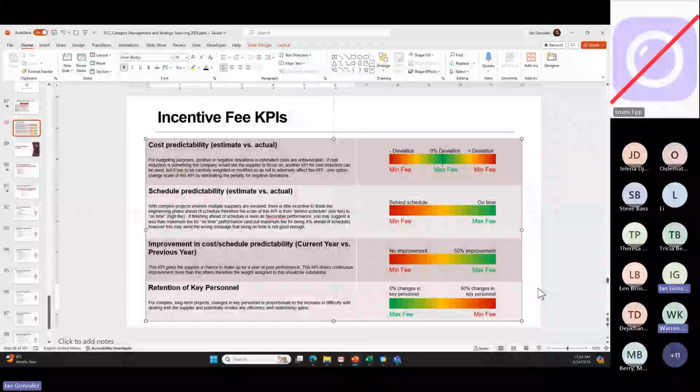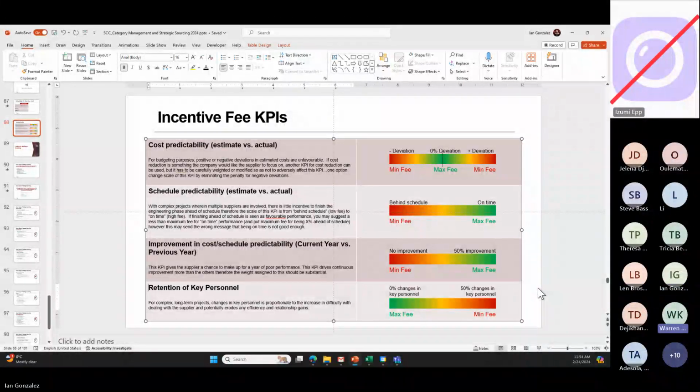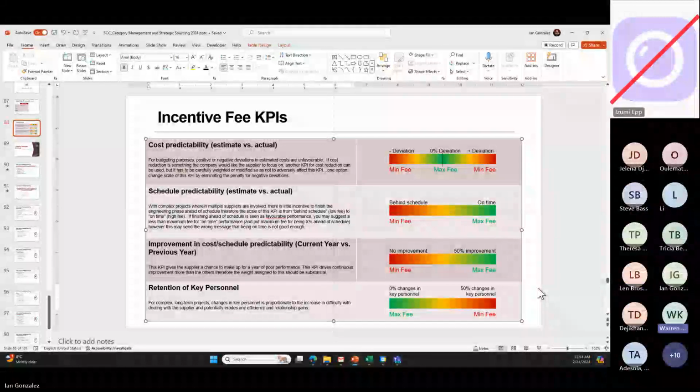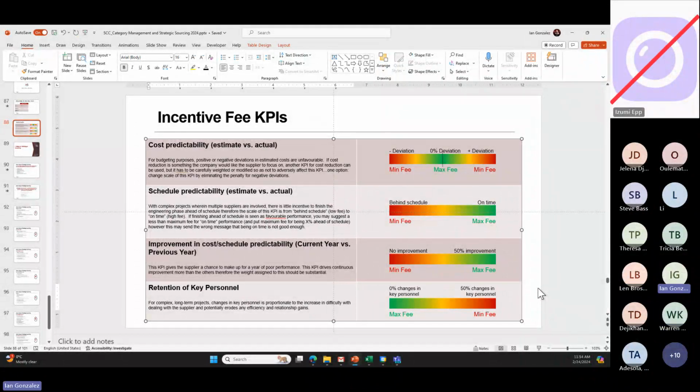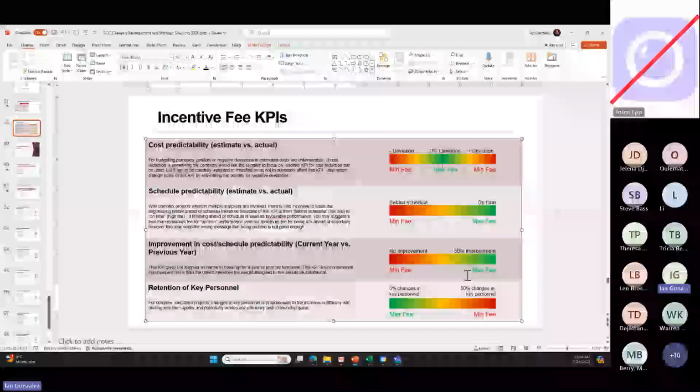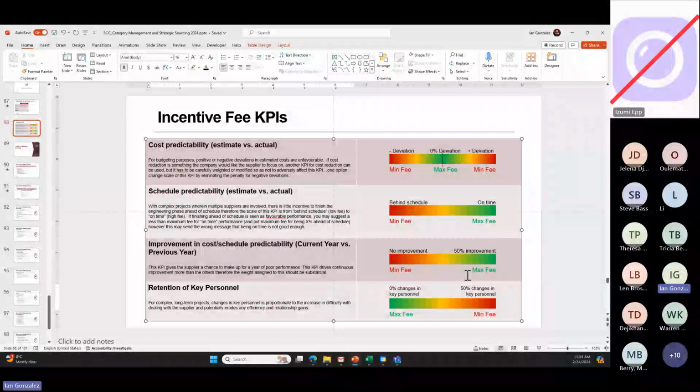Okay, so it's almost like you're giving them a bonus sometimes, and other times they're just not going to make the total amount. They're just going to make 97% of the total amount that you promised them because they didn't meet certain KPIs. I think that's kind of what you're saying, right? That's what this is. I mean, the reimbursable part, you don't hit them on that. You reimburse them on the cost they use. This is supposed to only affect the top up, the fee, the profit part. Okay, great, thank you.